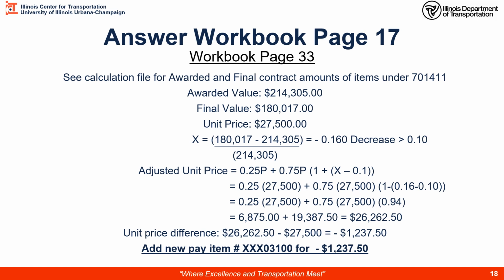So we're going to put in our absolute value, which is the 0.16. Then we're going to subtract off our tenth per the formula. And we know this is a decrease, so we're going to subtract in this case. So this is where our subtraction sign goes. We do not use this subtraction. We perform this function and then subtract it here. Crank through the rest of our equation. In this case, we got 0.94 times.